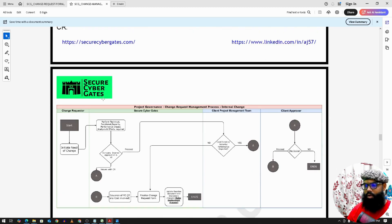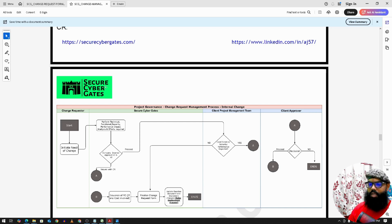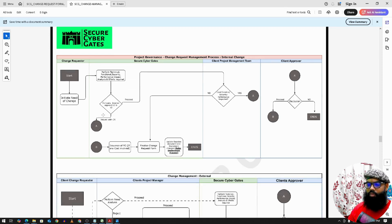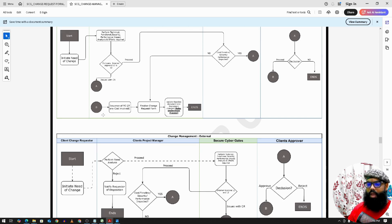There are two types of change flows: internal and external. An internal change might arise from our company policy of performing VAPT (Vulnerability Analysis and Penetration Testing) on the client's application at least twice a year. During this internal exercise, fixes may be needed for the application; we request the client to review the documents and the need for change before proceeding. An external change occurs when the client requests modifications to existing features, vulnerability fixes, or other changes.